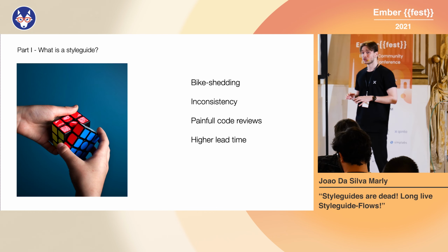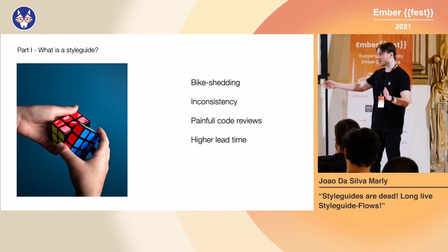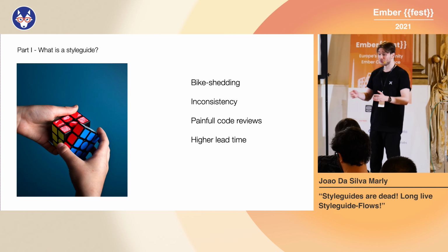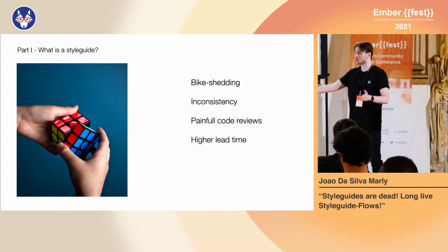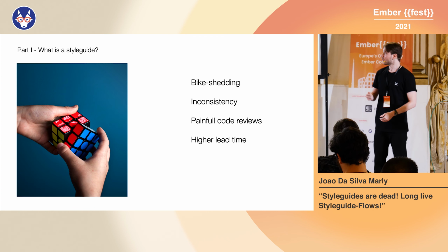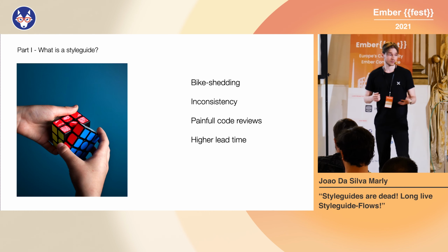It definitely leads to higher lead time. Lead time is the time that a feature takes from the start to the end. So if the review takes longer, for example, and if basically any of the steps of the development of the feature takes longer, it will increase the lead time of the feature. It's bad for the company, it's bad for the product, and it's bad for the quality.